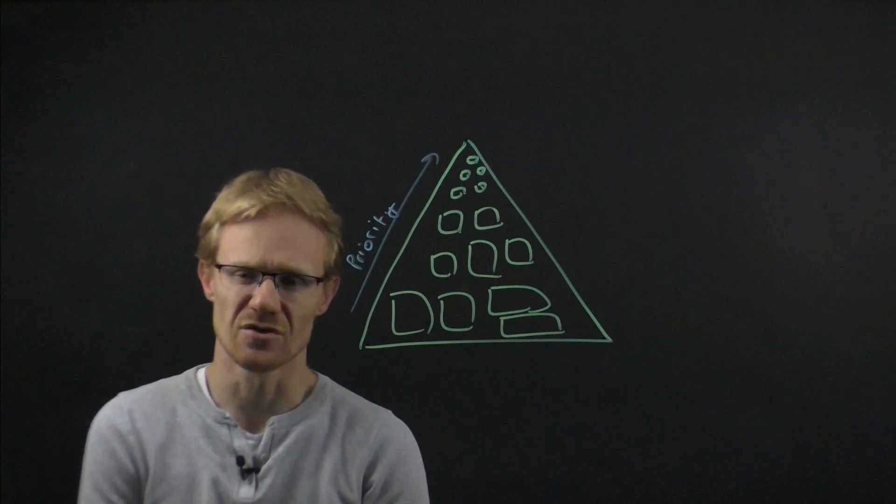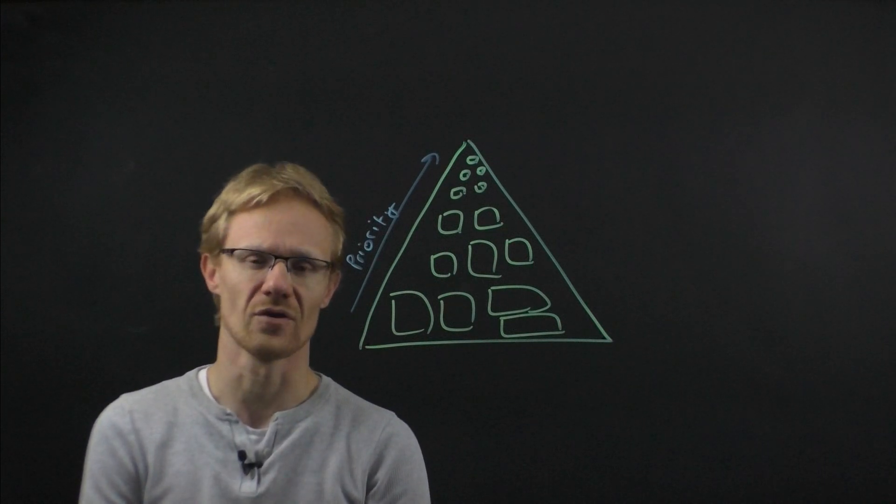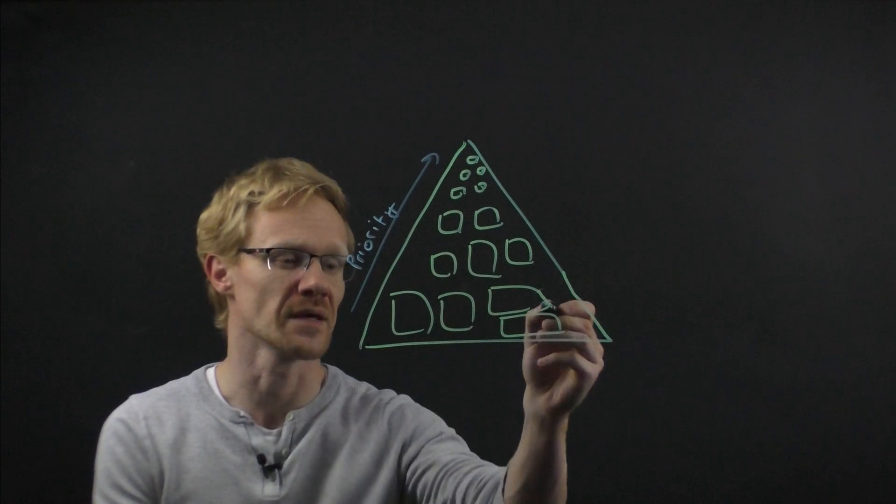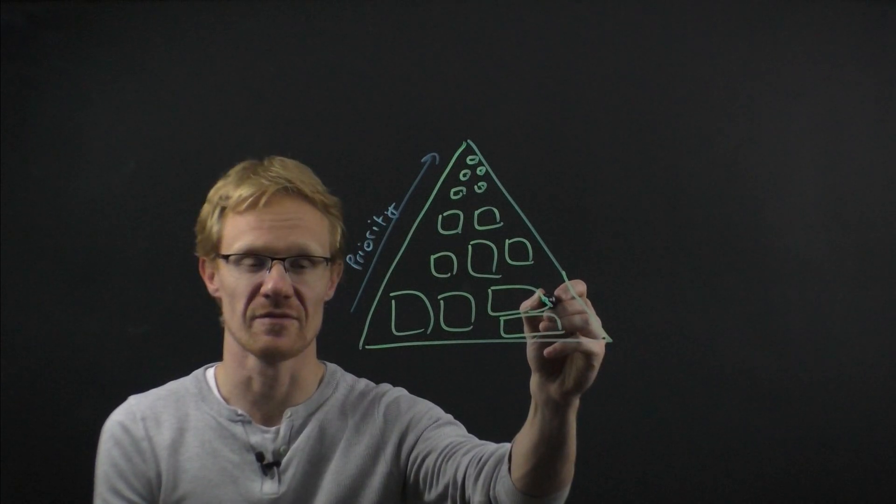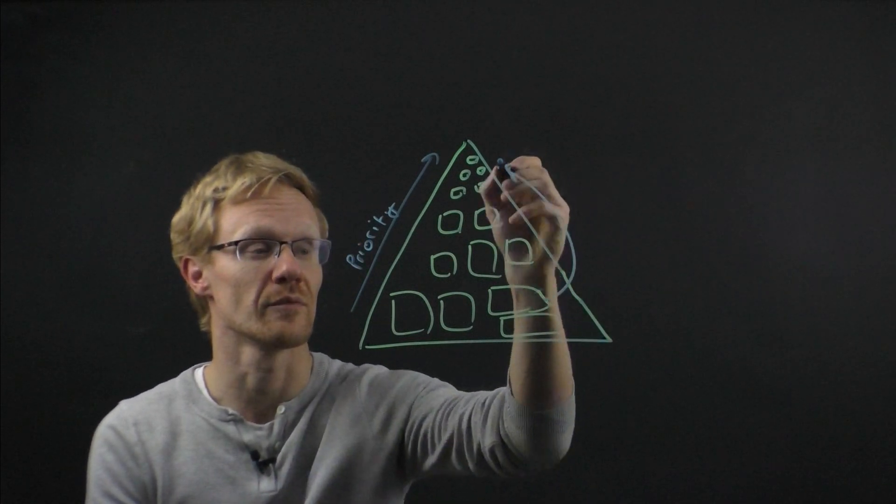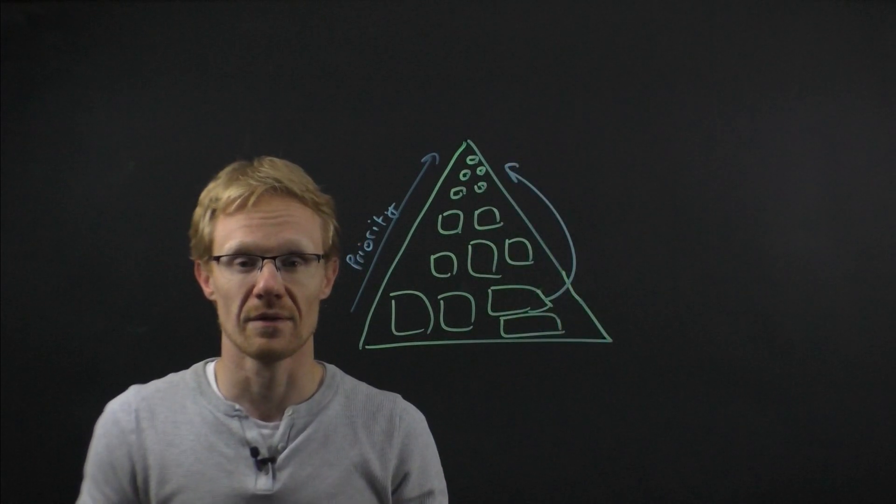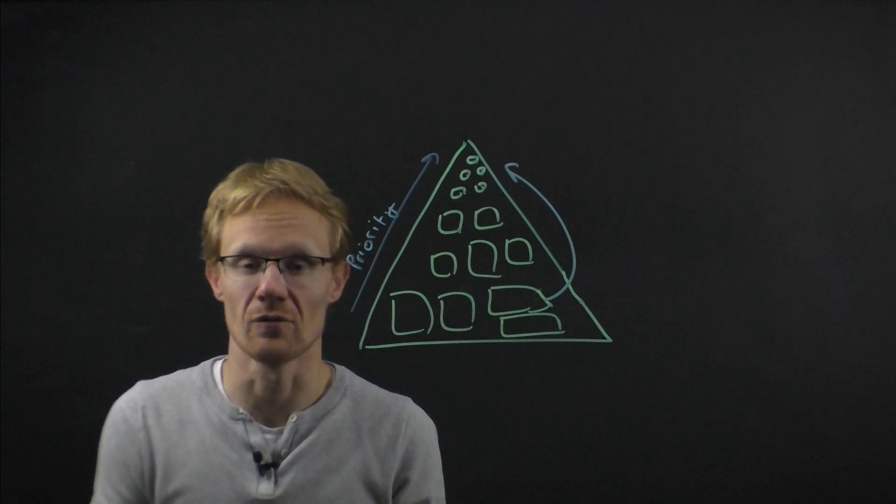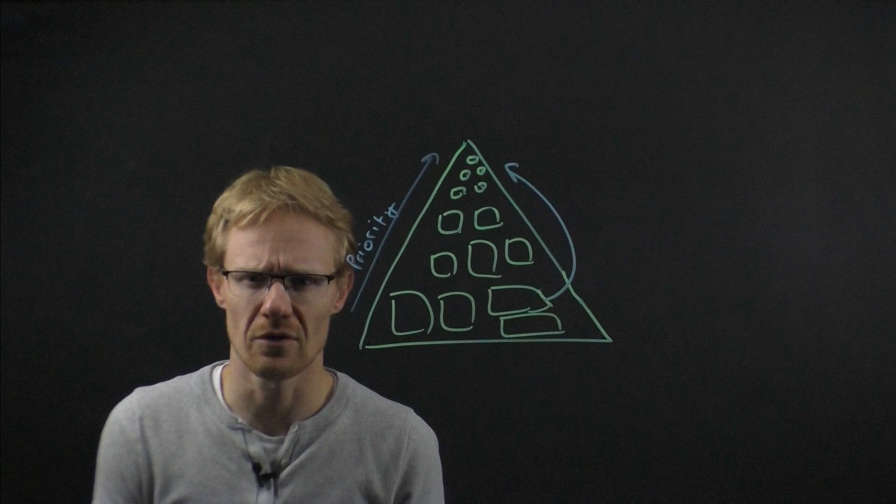Now of course we don't want large, unrefined work items at the top of that pyramid. And if there is an attempt to change the priorities by saying this thing, which is very vague, undefined and without acceptance criteria, up the priority list, there will be a natural pushback from the development team by saying quite reasonably, well this story is not ready.